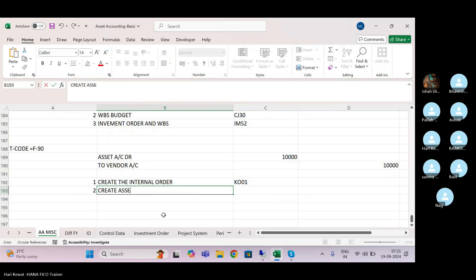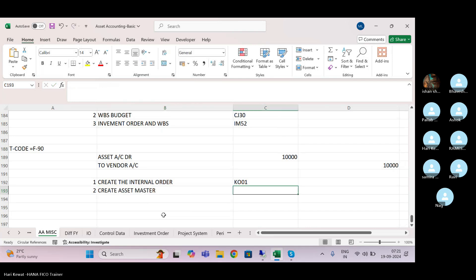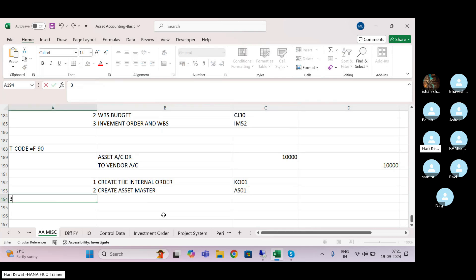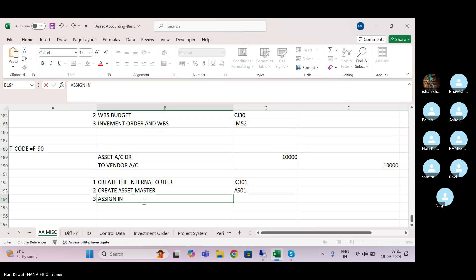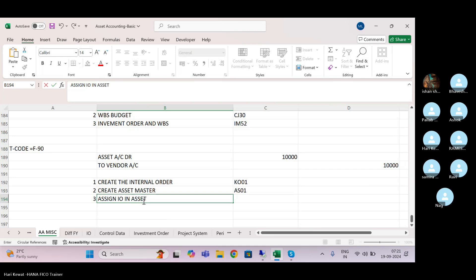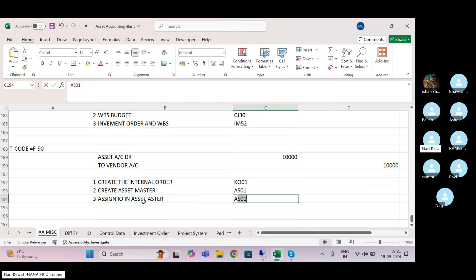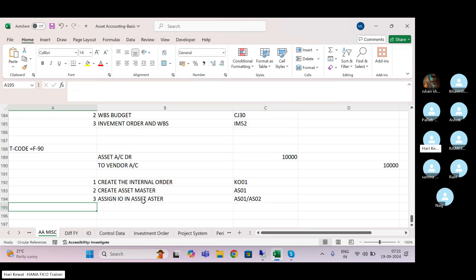Step two: create the asset master — AS01. Whatever asset you are going to purchase, create one asset master. Step three: in the asset master, you have to assign this internal order for which you have loaded the budget. Assign the internal order in the asset master in AS01 or AS02. You can assign it during creation time or after creation.